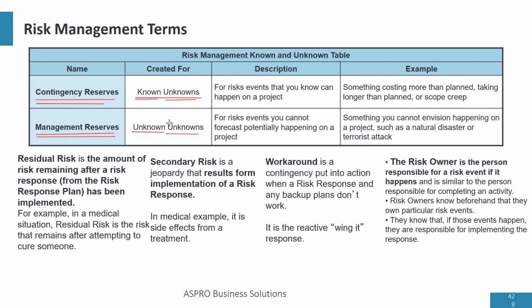The Spanish flu happened as a pandemic in the world back then, 1859. Who was alive? So, when you say pandemic, nobody in our current time has experienced it. So it was like an unknown risk. So COVID is an example of an unknown risk, a risk that you don't even know exists. And the second unknown is you don't even know whether this unknown risk is going to happen on your project. You keep aside management reserve to take care of unknown unknowns.